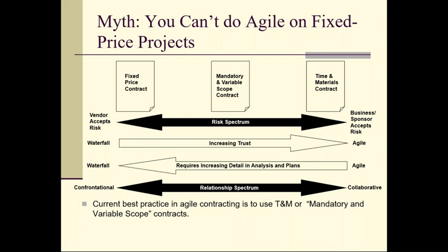Now, that mandatory phase, for sure we're going to do those mandatory things, because by definition, they're mandatory. If for sure we're going to do them, then there's no great risk of waste in us spending the time up front analyzing those must-haves in all of their glory. Let's get all the detail out on the table. Let's really understand them intimately. Once we understand those features, those deliverables, those requirements in true detail, down to the nth degree, then I can estimate the work required with some confidence. And I can build in the appropriate contingencies because I can do a proper risk assessment and risk analysis, and I can come up with a fixed price contract for the first phase.